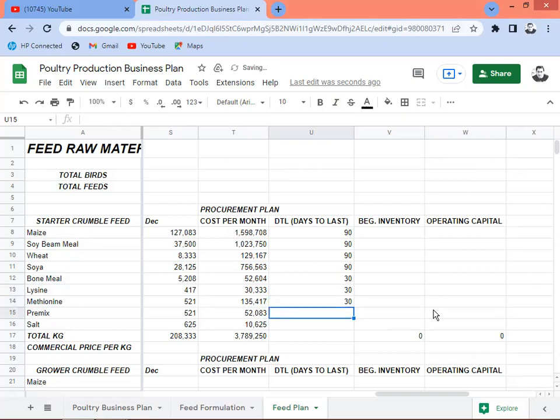So you only need to prepare the time for the processing of the PR and the purchase order, and you don't have to process the LC because this is local. The LC is only for importation of raw materials, and from getting it through what they call customs clearance. You have to clear it from the customs in the harbor to get your materials, to load your materials to your company inbound warehouse.